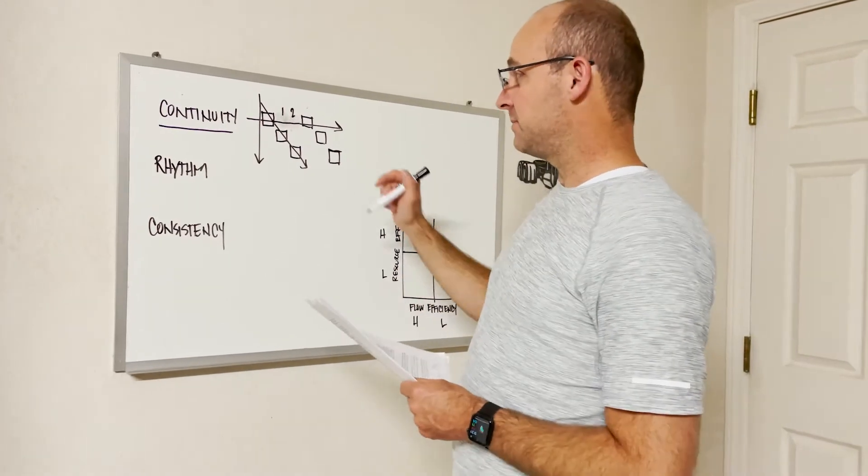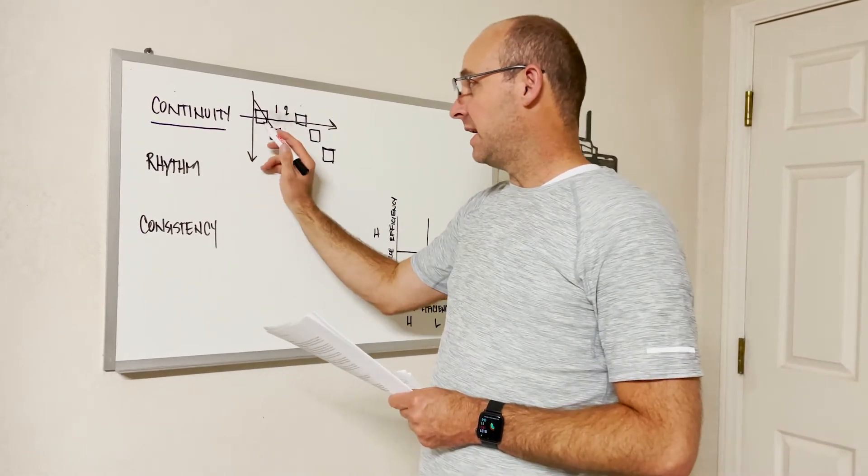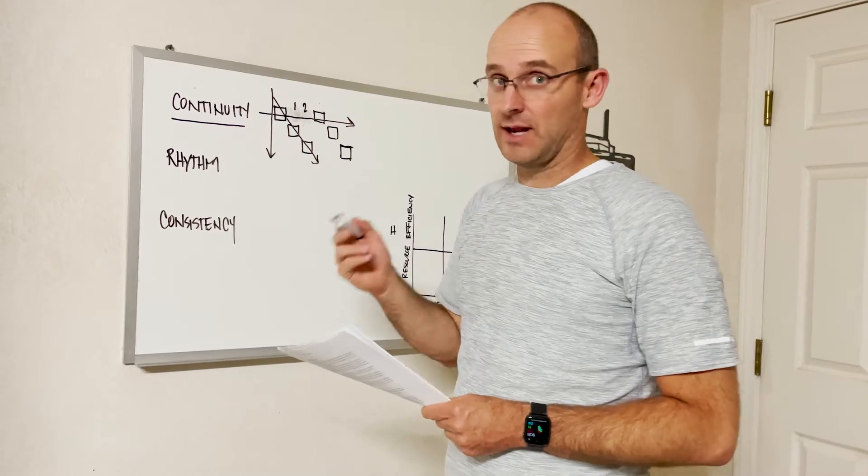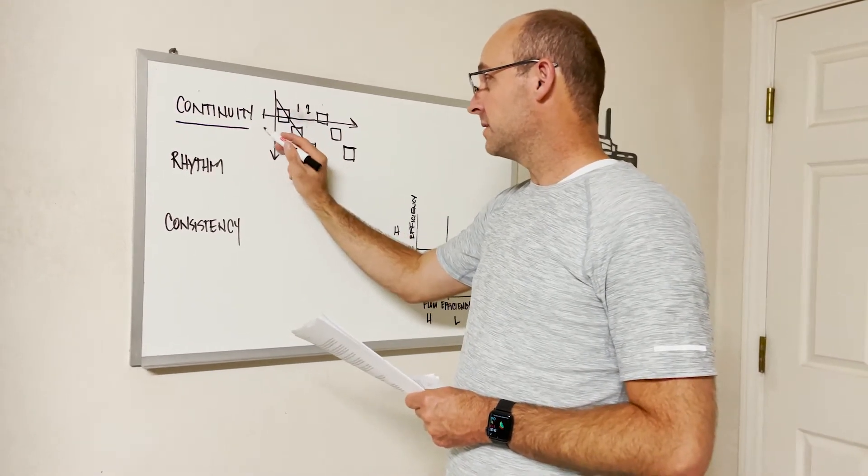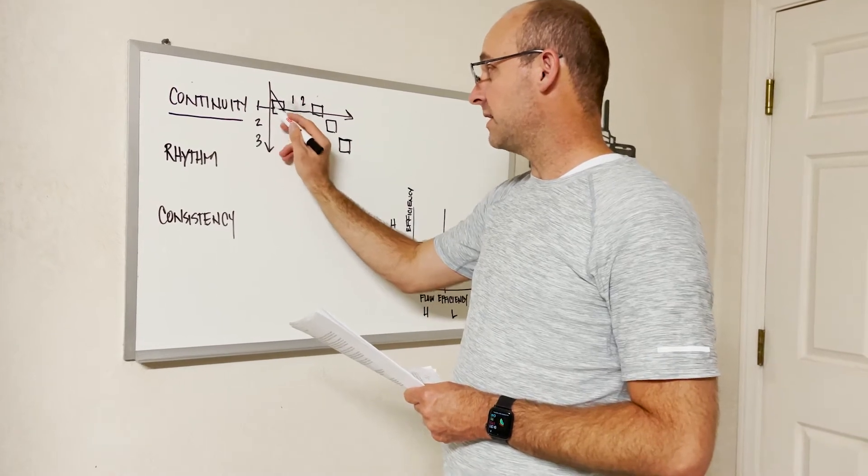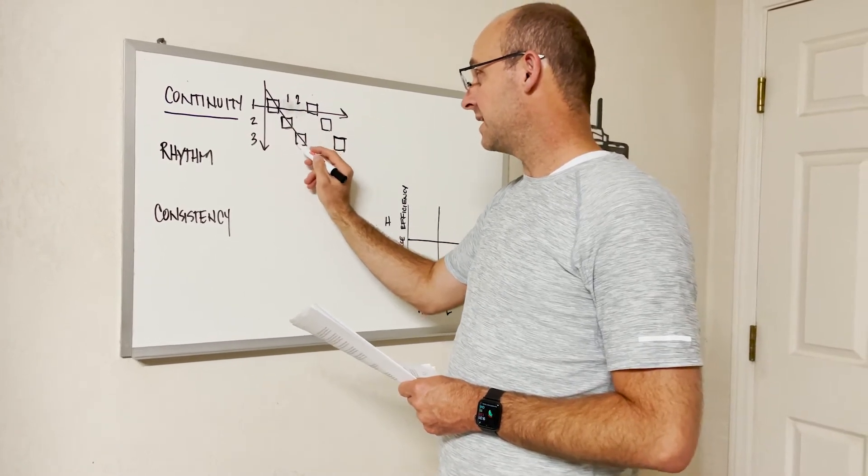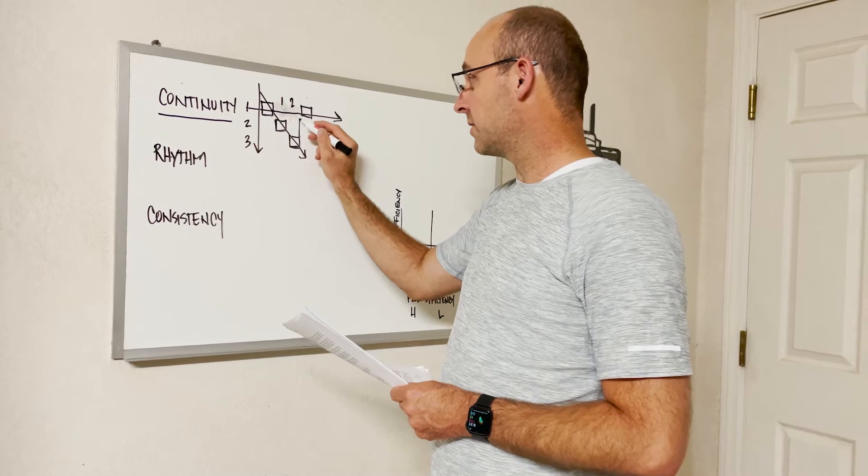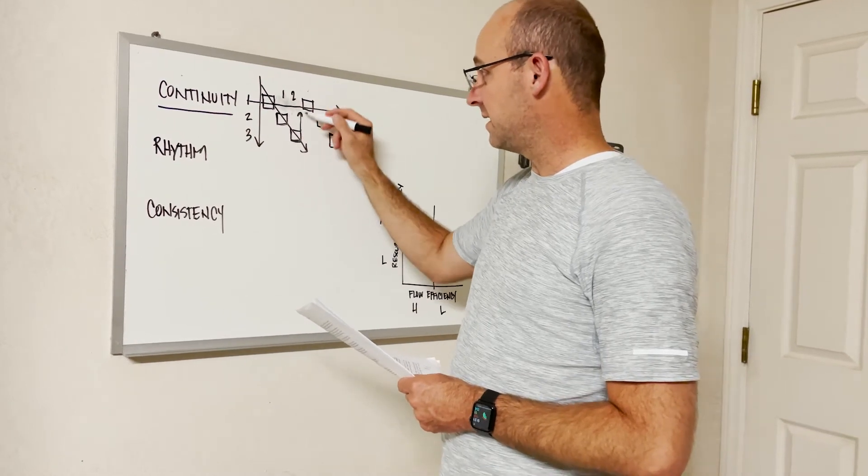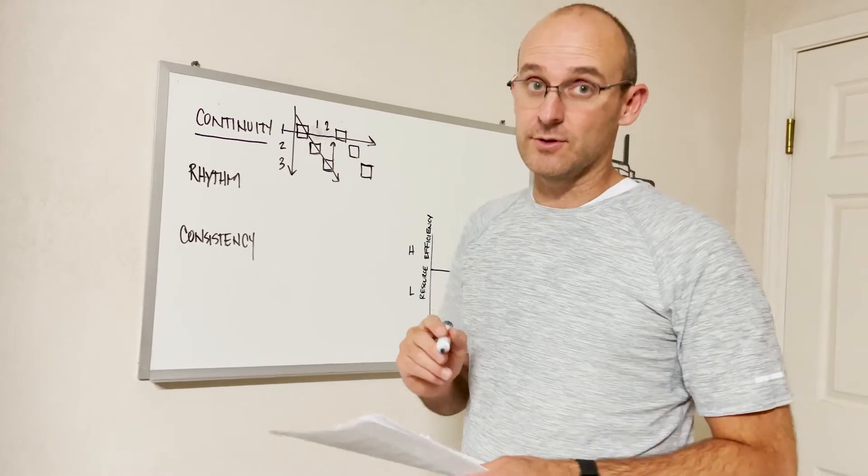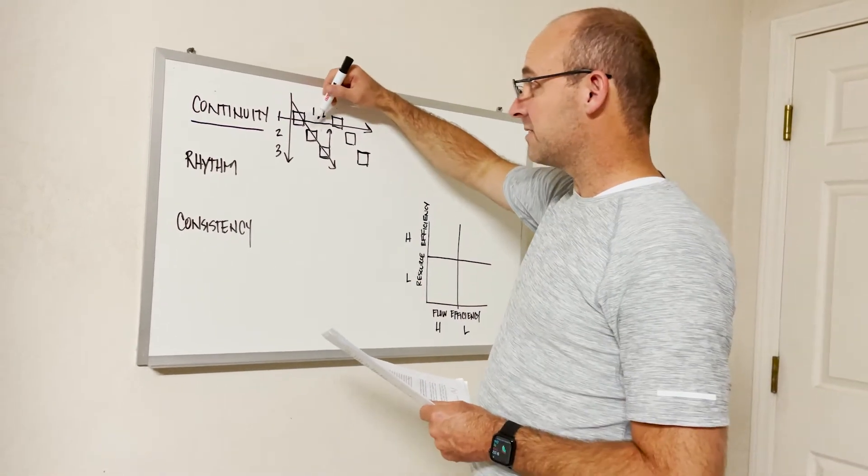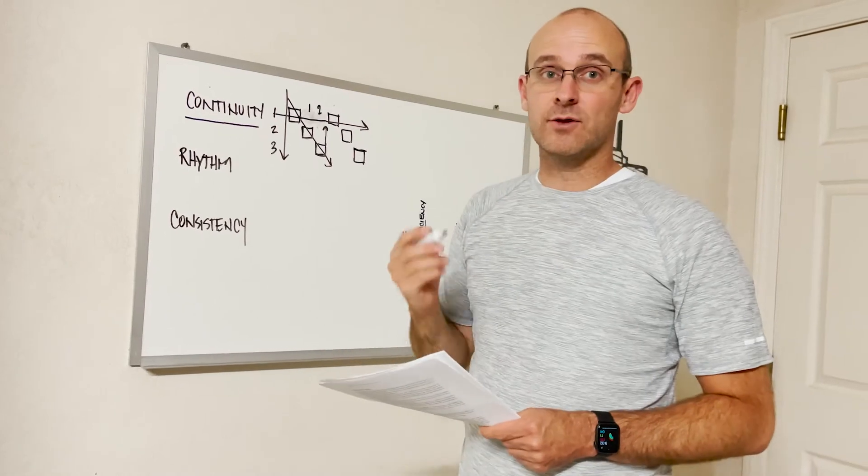Now sometimes because you have a crew, maybe this is crew number one, and you don't have a second crew. It has to go from area one to area two to area three for this activity. And it can't start this one until it's done here. And it goes one, two, three for the second activity, but with the same crew. But that creates a lack of continuity between the workflow.